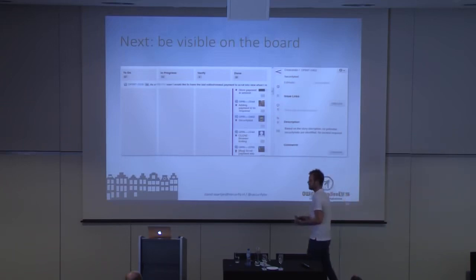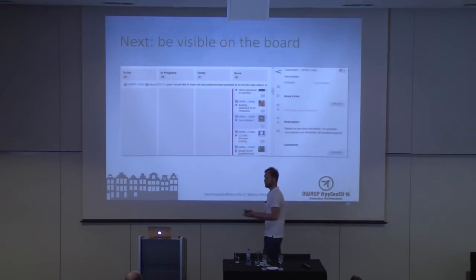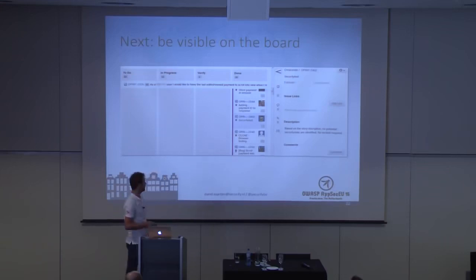If after half an hour of reviewing you still didn't know if it's security relevant, because it was a bunch of code which you can never review in half an hour, we just added a security story to it that it needed reviewing later on, and otherwise we could just close it, yeah, we checked it, or we see it's not required. So just be practical with this.